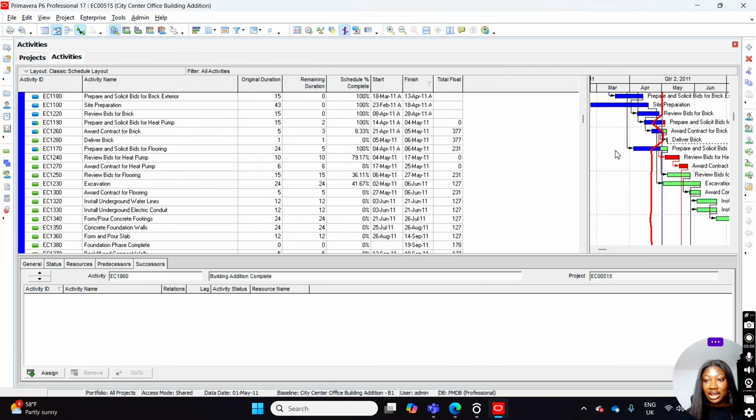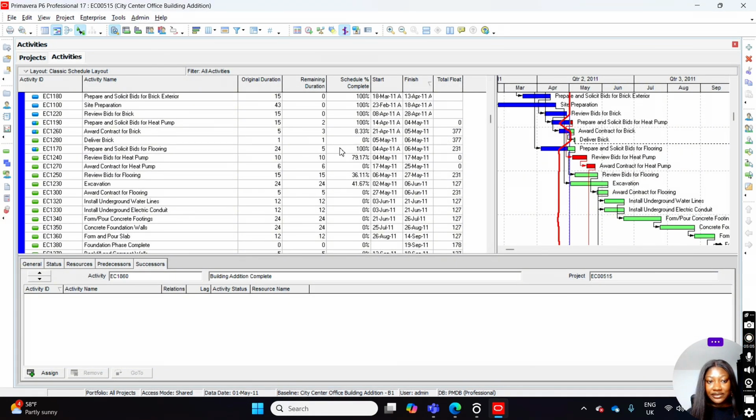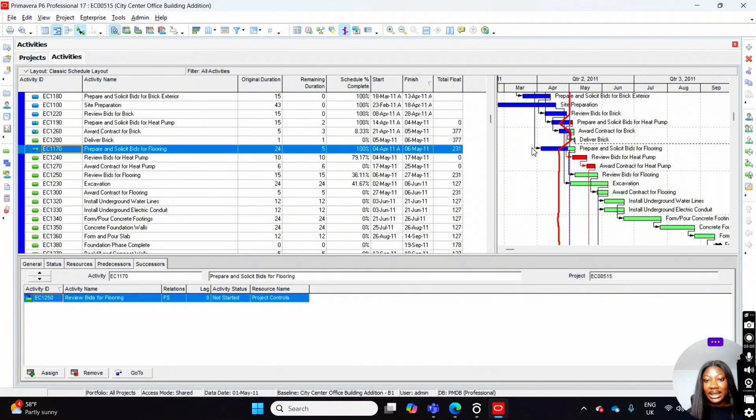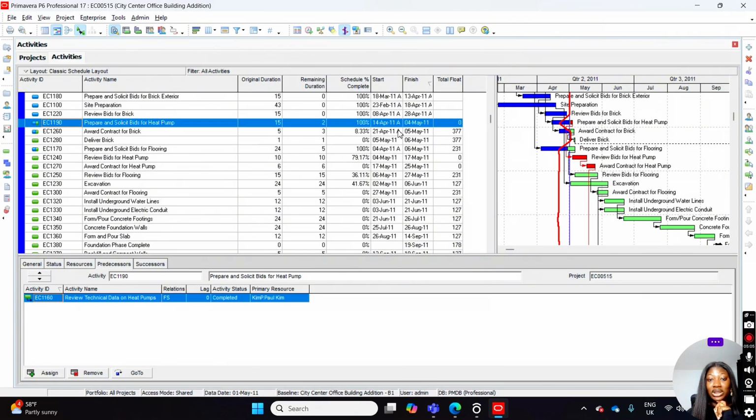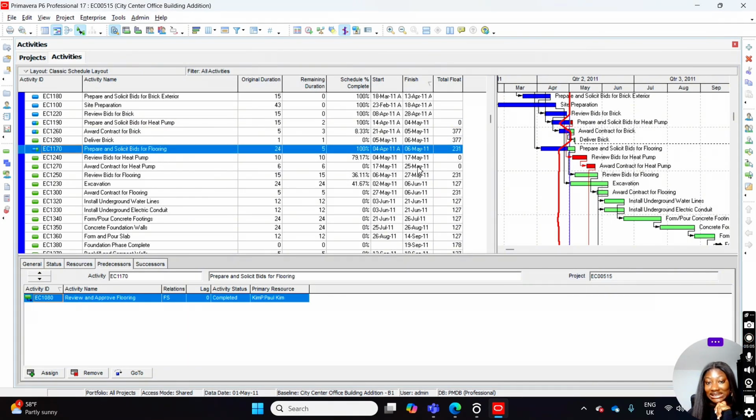For now, we are saying that on the list view, if you pull back the Gantt chart, we are here in the project. This is ongoing and it's to finish in May. However, this activity in red should have started, but has not, or doesn't look like it's going to start right in time, because this activity in red was supposed to start on the 4th of May, but the predecessor activity, which is the activity before it, was supposed to finish first before it starts, but that one is not finishing till the 6th of May.